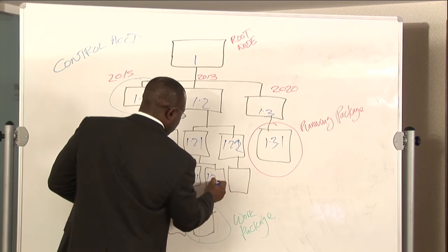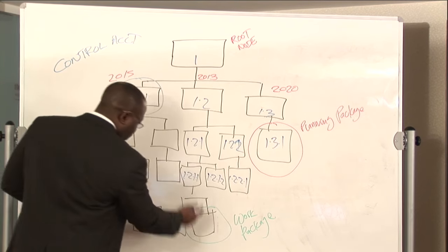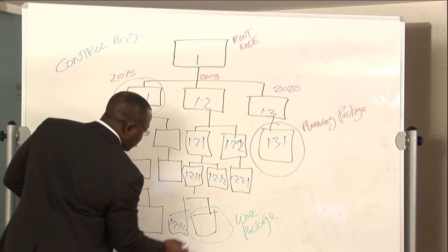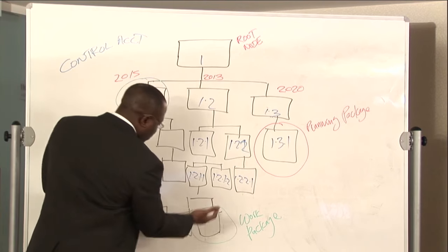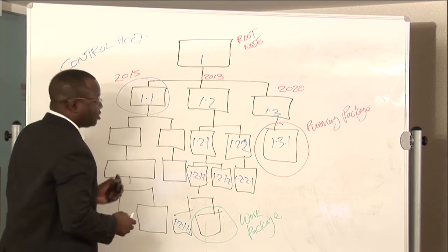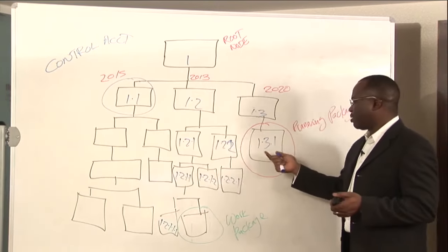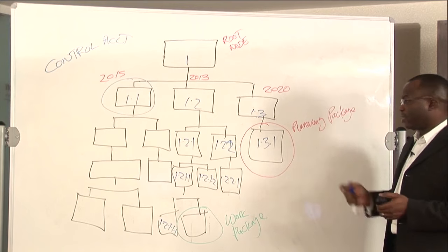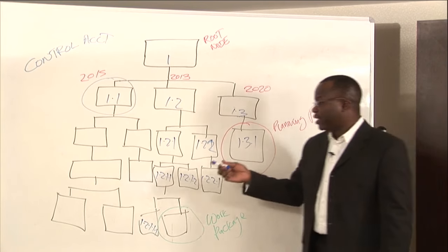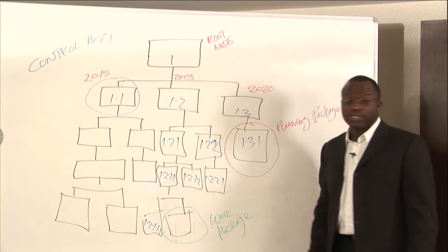1.2.1.1, 1.2.1.2, 1.2.2.1, and you just follow it all the way down the chain. This would eventually be 1.2.1.1.1, and so on. So when you get down to the lowest level, if you count the number of digits, 1, 2, 3, 4, 5, that should tell you the level in the WBS that you are. For example, if someone says you have a WBS component, 1.3.1, what level in the WBS is it? It is level 3 because it's got 3 digits. If someone says 1.2.1.1, what level is it? You just count the digits, okay?